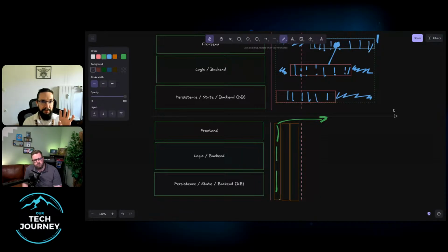And the really important aspect here is that simple or 0 for this kind of UI could be that you can't prompt, right? That you just have a few buttons and you say, yeah, pick one of the prompts that we've prepared. Here's a proof of concept, and it does like everything, back end to front end, persistence to front end. That would be like a 0 state, because what we're focusing on when we're vertically slicing is we don't necessarily need to deploy each slice to the user.